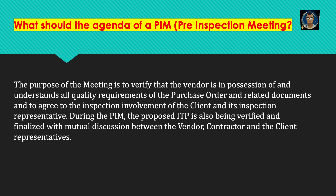What should be the agenda of a PIM or pre-inspection meeting? The purpose of the meeting is to verify that the vendor is in possession of and understands all quality requirements of the purchase order and related documents, and to agree to the inspection involvement of the client and its inspection representative. During the PIM, the proposed ITP is also verified and finalized through mutual discussion between the vendor, contractor, and the client representative.